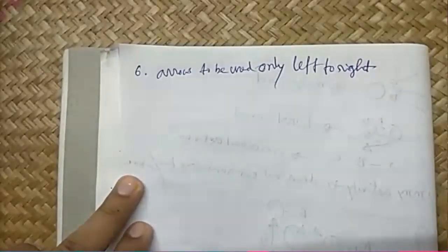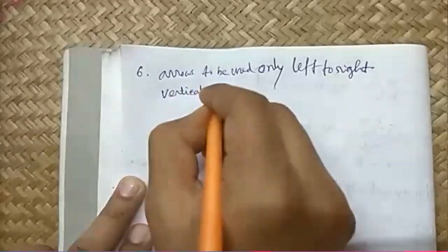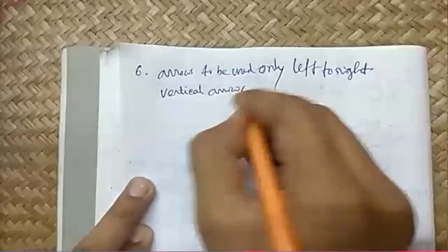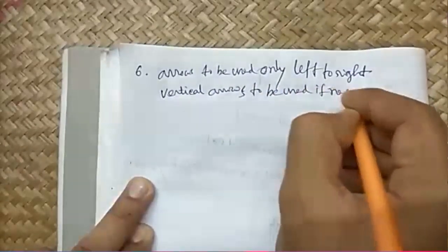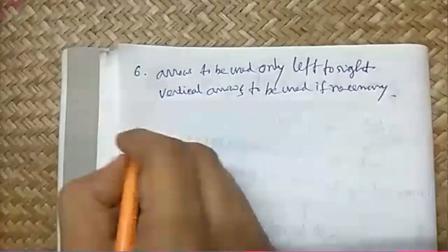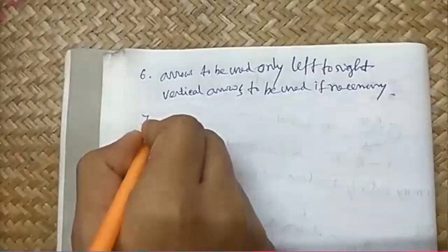Vertical and standing arrows may be used if necessary, but no backward arrow is allowed.